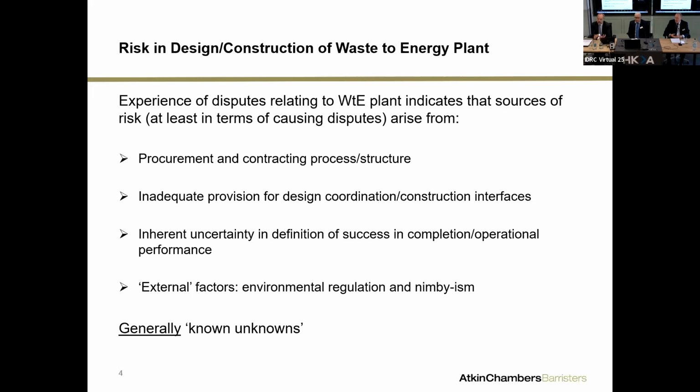Failure to think through properly, at the procurement and contracting stage, how you're going to structure the procurement and contracting. That's the mix and match problem. Inadequate provision for the design, coordination and construction interfaces, depending on which contract procurement process you've adopted, which I'll look at just now. A particular problem, which I'll end up with, is how one defines success in a waste to energy environment.